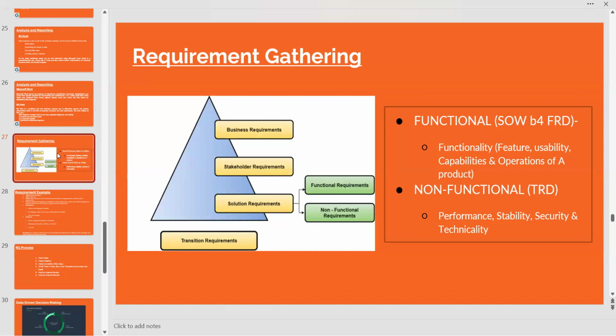Along with that, the costing is provided. Like if that is going to cost you, per se, 1 million extra dollars, I'm just giving a hypothetical big amount, it will create an impact. And you come up with the timeline along with the money, definitely the timeline. Okay, so this will require an additional 2 months of work, or an additional 1 month of work. So if the customer is okay to spend extra money and extra time for that requirement, and if it is doable and feasible, then we go ahead.